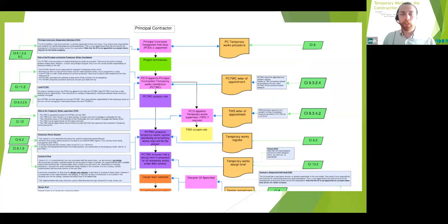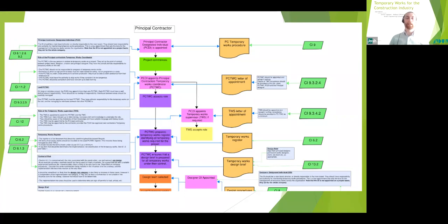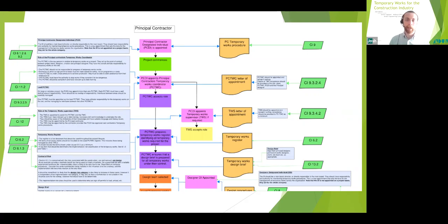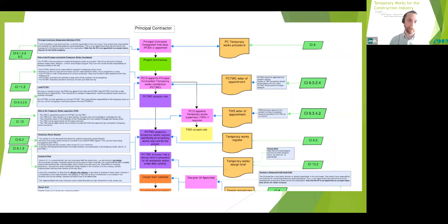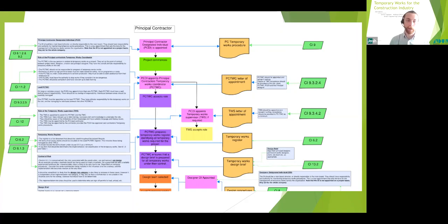So let's begin, and let's start at the top. Every contractor should have a designated individual or DI if they're controlling temporary works. This first stage is the appointment of the principal contractor's designated individual, or the PCDI. They will take responsibility and they cannot pass it on. They are essentially in the firing line and are the person who says whether someone is competent and makes the relevant appointments of the other roles required to control the temporary works, such as temporary works coordinator and the temporary works supervisor, or TWC and TWS. The DI is generally someone with a background in engineering at a high level within a company, usually directly responsible to a board of directors or on the board of directors. The project can then commence, and the lead TWC, known as the PC TWC—the principal contractor's temporary works coordinator—is then appointed.